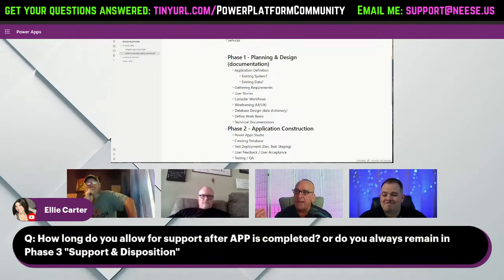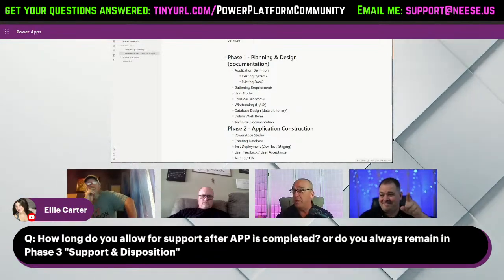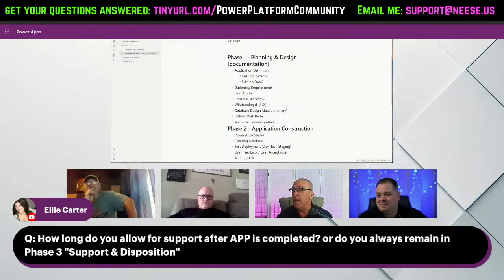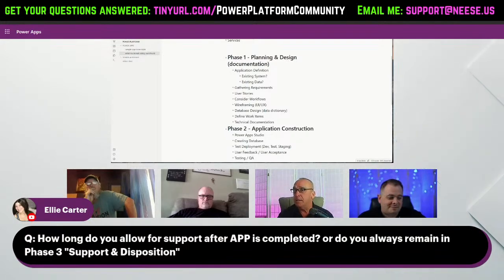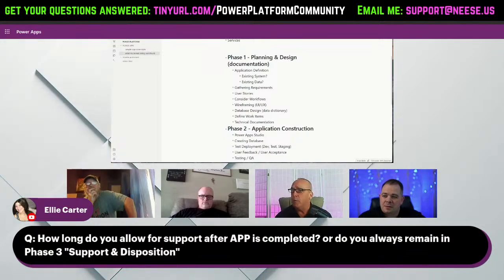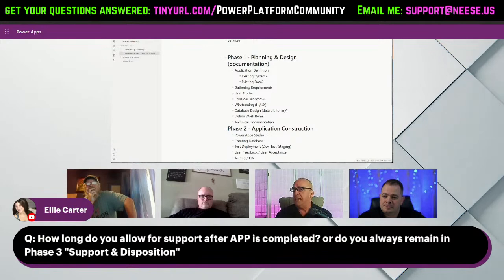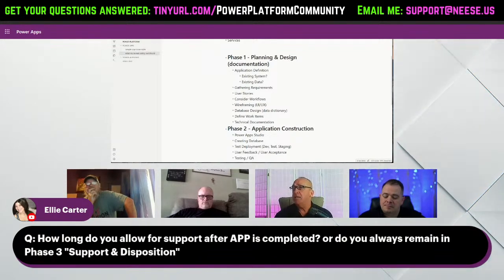It's not going to take much time at all. And if it's something that I've got to really look into, like say for you and I, like Kurt and Darren are going to go in here and look at this thing, I'm going to say, look, it's going to cost you $1,000, maybe $2,000, depending on how big this thing is. It's going to cost $1,000 to $2,000 for us to do a request for quote. We're going to research this thing and create a quote for you. And it's going to cost you $1,000 to $2,000 to give you a good cost estimate of what it's going to take to do this.